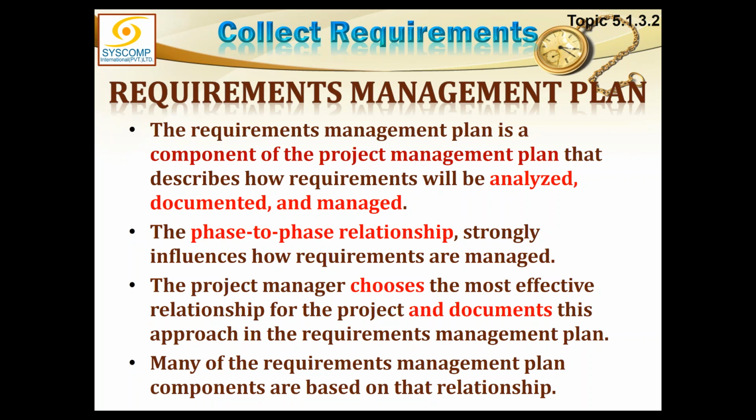So though we don't know the phases as yet, but generally how this handover will take place. The project manager chooses the most effective relationship for the project and documents this approach in the requirement management plan. You understand that management plans just contain the approach. They do not contain the document itself, the procedure itself. That would be designed later. So when we will be collecting the requirements, actual data will be populated at that point in time.